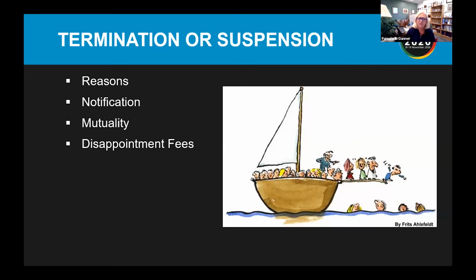I have also heard that there are disappointment fees, and these would be a penalty for the client terminating a project early. This is because many times you have a fixed fee contract. So if you have a fixed fee contract, there should be a penalty for pulling out early because you have dedicated resources to this contract and not been able to use those resources for other clients.